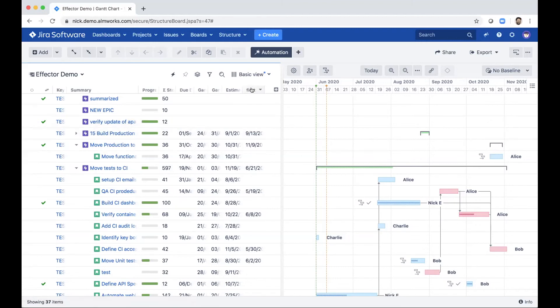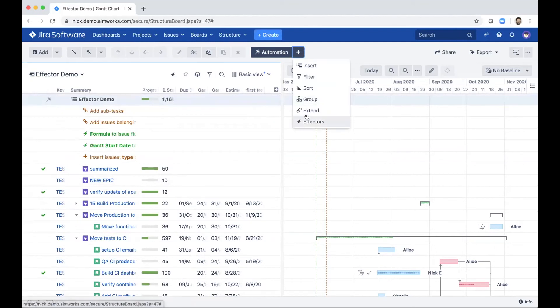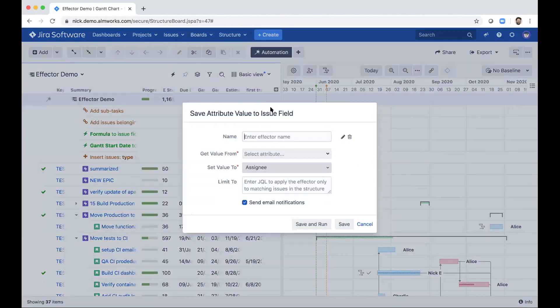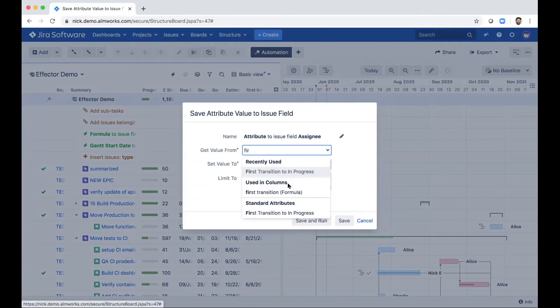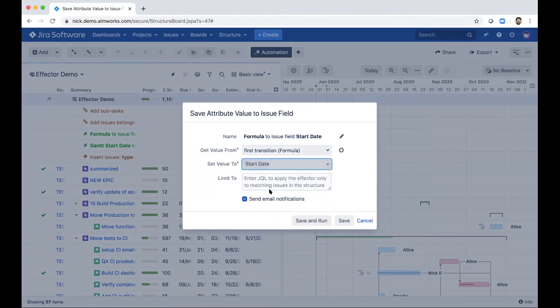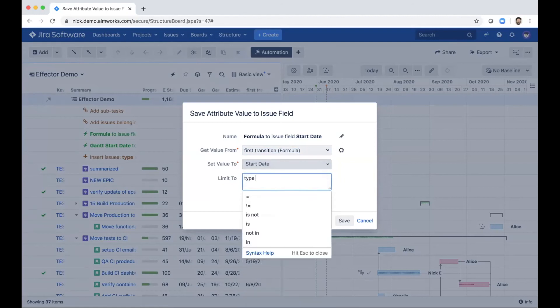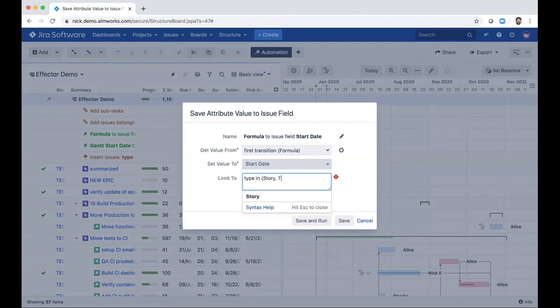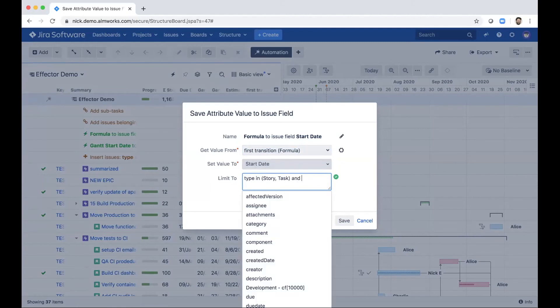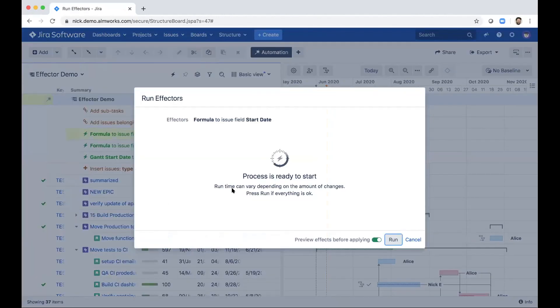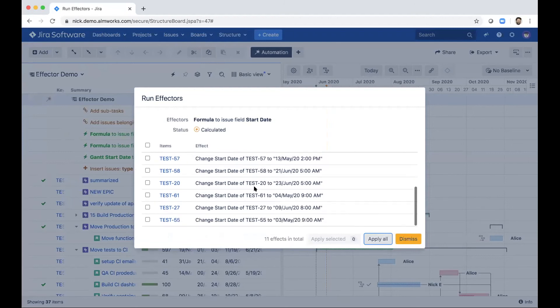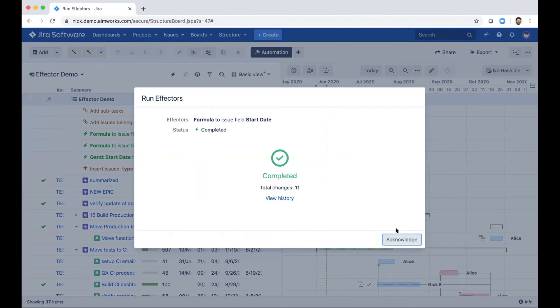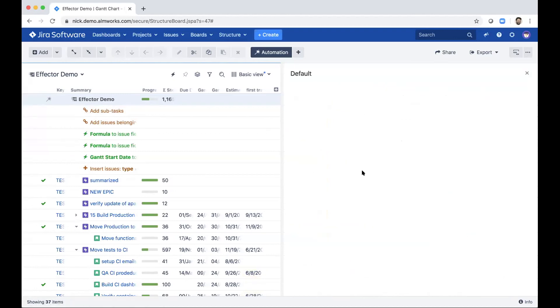So I can kind of do the same thing. I've got this field here, which is the first transition into progress. And I can create another effector and kind of do the same thing here. I'll do my first transition into progress and then I can copy that over to my start date, and I'll do that for all of the stories and tasks again in this project. And so this one should be quite a few more issues. Yeah, it looks like we've got a longer list here. We'll apply those.